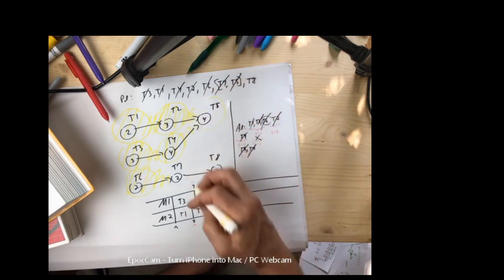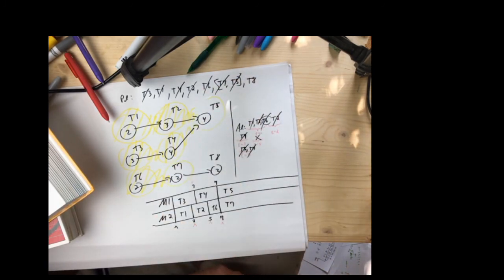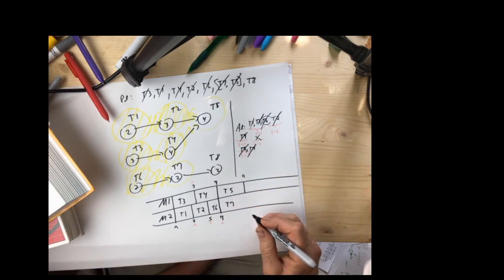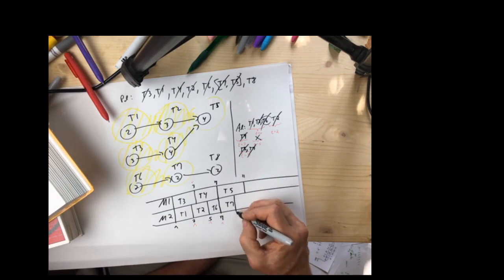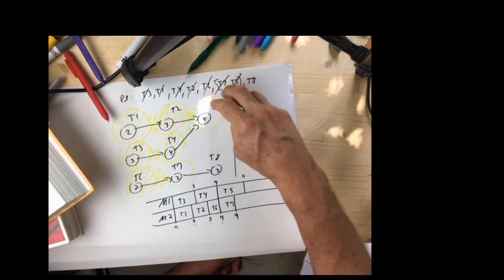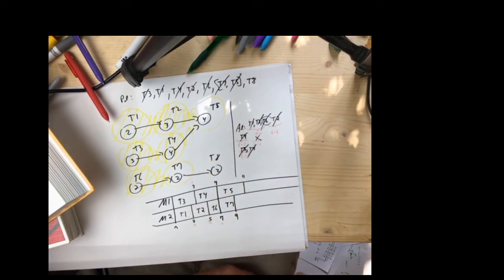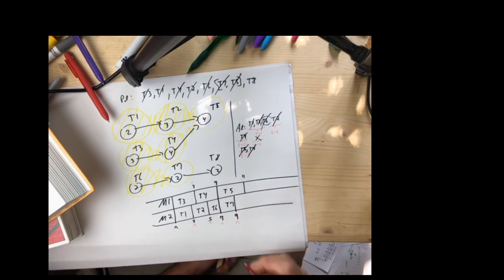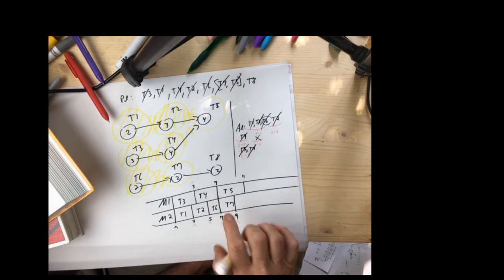So, we assign them. We put the end of time markers. 7 plus 4 is 11. 7 plus 2 is 9. I updated that, updated that, updated that. Time to take a nap, and machine 2 wakes up the boss at 9 o'clock. Why? T7 is completed,